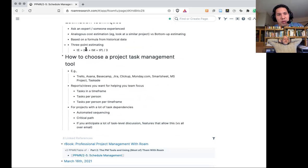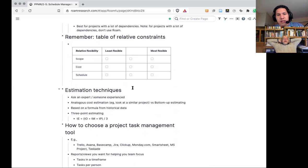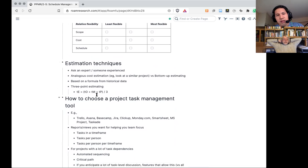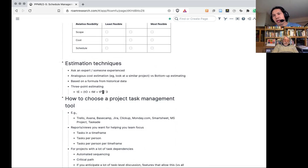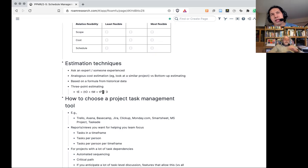There's also three-point estimating, which is just an average of the optimistic, the pessimistic, and the most likely duration. For each task you do three estimates: T0 (optimistic time), TM (most likely time), and TP (pessimistic time). It's really a rule of thumb, but it helps consider different scenarios — if the pessimistic estimate is very large, you'll take that pessimistic scenario into consideration in your overall estimates.